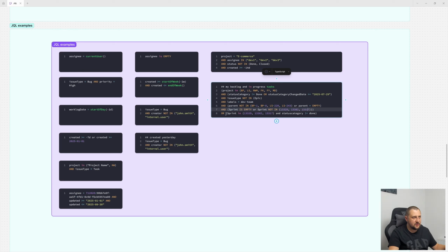And then I have this OR operator. In this case, I am adding to this report a list of tasks, because this one from row 2 to 7, it is my backlog. And row 8, it's tasks which are assigned to the current sprint, like not in backlog. So I use this filter to get the data for the backlog report and for the actual sprint report.